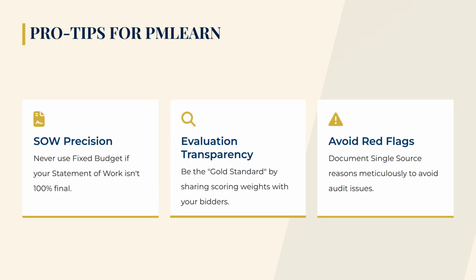To wrap up, here are 3 PMLearn execution pro tips to take with you. First, statement of work, SOW, precision. Never use a fixed budget method if your statement of work is fuzzy. Scope creep will completely destroy your vendor's margin, leading to disputes.